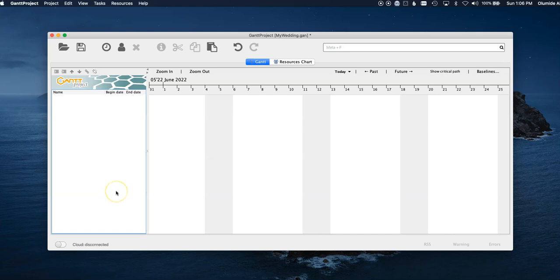If you have it written down, you can just start putting it in here. It will even be a great idea to be bringing them in from a work breakdown structure. There are two ways, just like creating resources, there are two ways to create activities. The first one is on the left work area, you can right click, new task, or you can click on the clock.